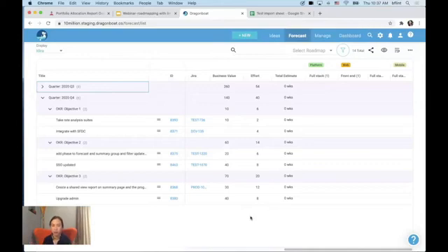In most cases, one feature probably contributes part of the goals. If we can achieve 100% of the goals, great, but chances are it's not likely. So you start to have this kind of benefit value, and then you have an effort, which is kind of like a t-shirt sizing. It gives you some understanding of the benefit and cost analysis. It also gives you some understanding at the quarterly level, do we have enough resources? Because overall it adds up to 40 weeks. Maybe we have 40 weeks, maybe we don't. So that gives us at least a general understanding. You can see Q3 and Q4 are relatively evenly distributed, so it's a good starting point.